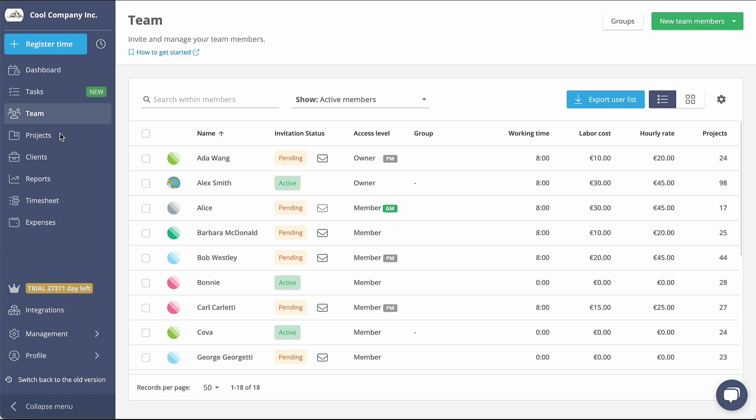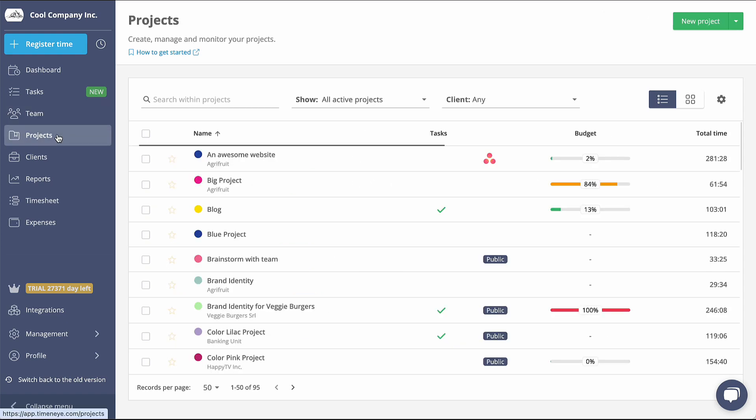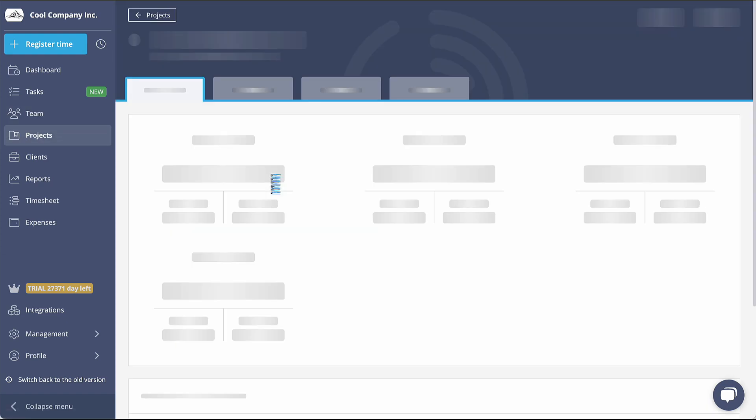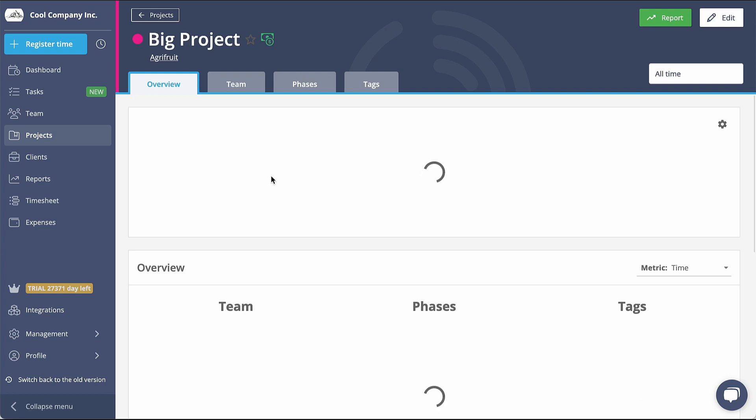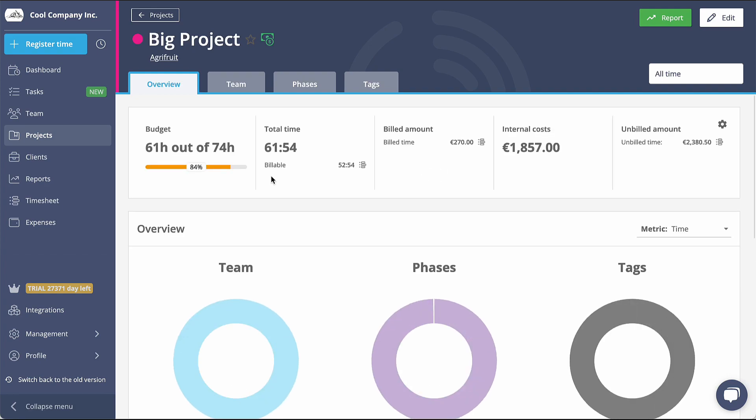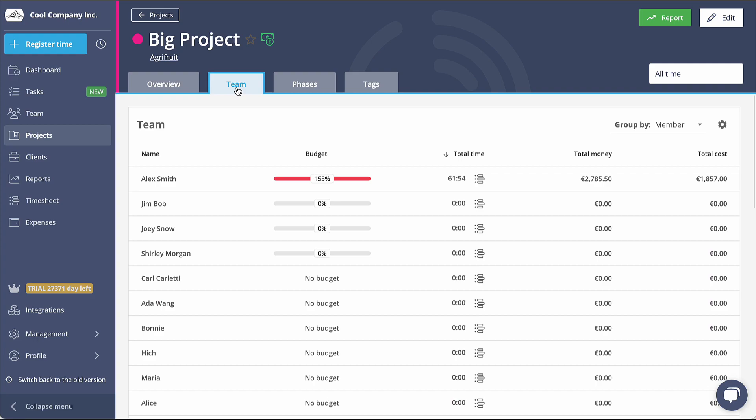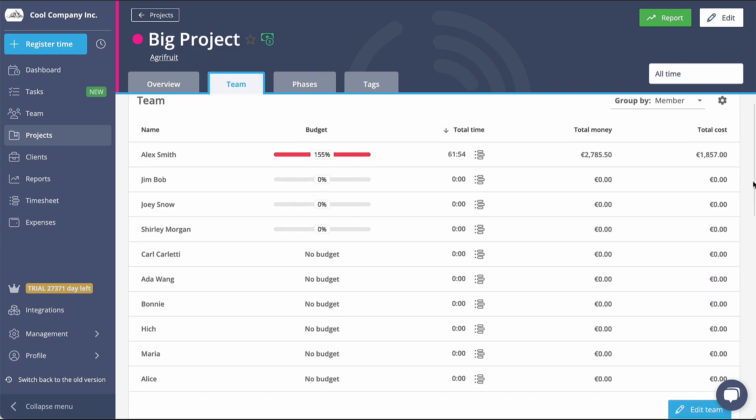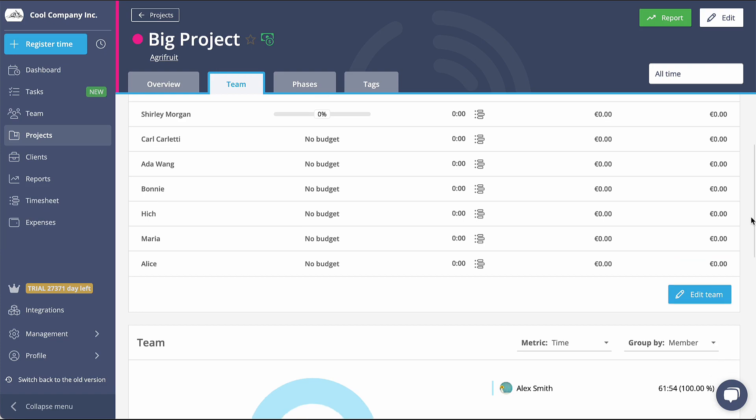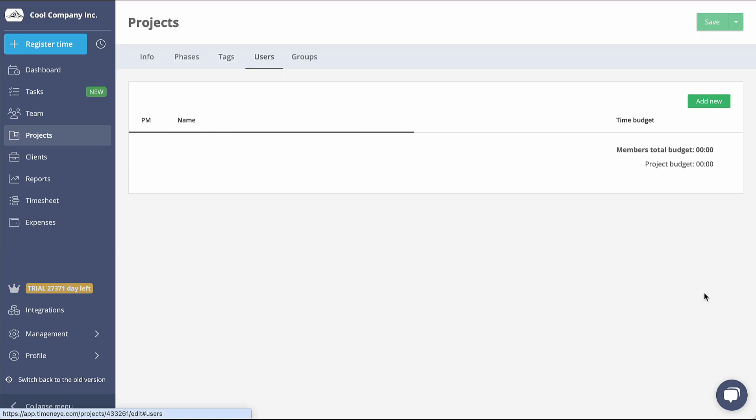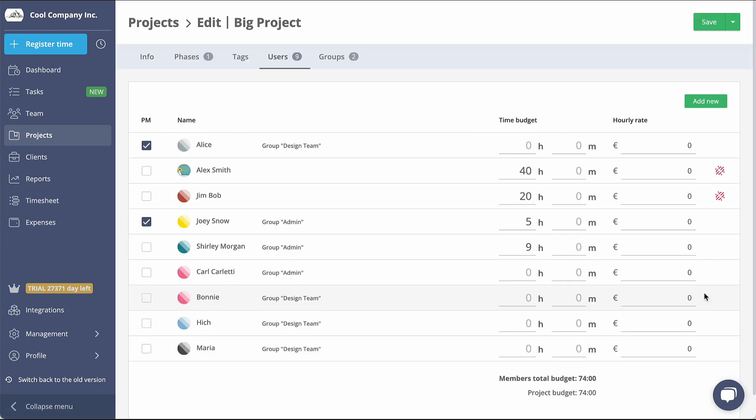To track your team's progress on a particular project, navigate to the Project Detail page and switch to the Team tab. In this section, you will find a comprehensive overview of the team members involved, as well as the time and money invested in the project. Click on Edit Team to modify individual user details and allocate a time budget.